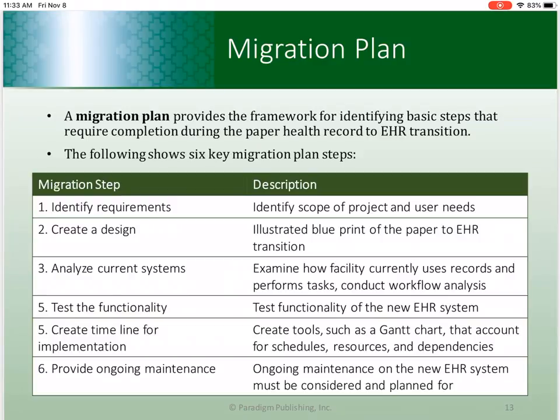Now, our fourth step is to test the functionality of the new EHR system. This type of testing focuses on several aspects, such as the way system modules work, the system load, or reliability of the system. Our fifth step is to create a timeline for implementation.